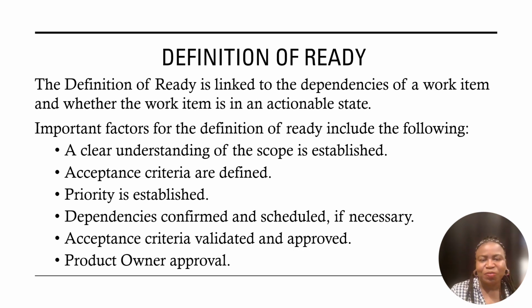Now, the definition of ready is really linked to the dependencies that need to be in place, that have been identified for that particular user story, and making certain that that user story is in an actionable state, meaning that there may be a precursor set of actions or data elements that need to be in place before you start to work on that particular user story.